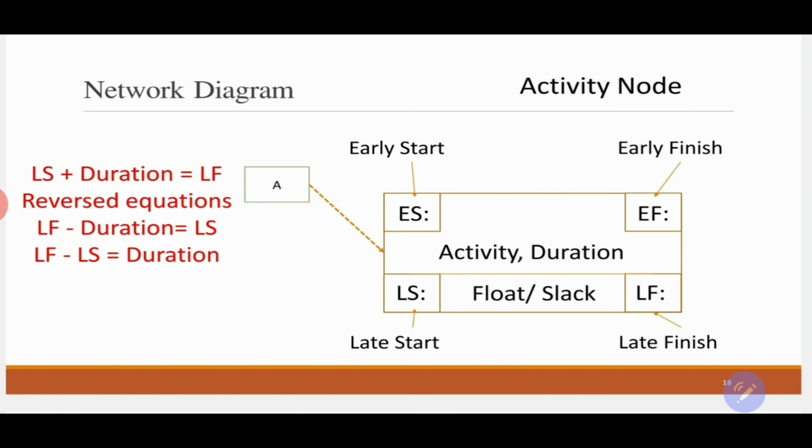The same applies for the formula to calculate the late start and late finish through the duration. The original formula is late start plus the duration will equal the late finish. And if you look into the reverse equations, late finish minus duration will equal late start, and late finish minus the late start will equal duration. And again, if you remember one of these equations it will be enough to know the other equations, because they are just simple math of reversed equations.